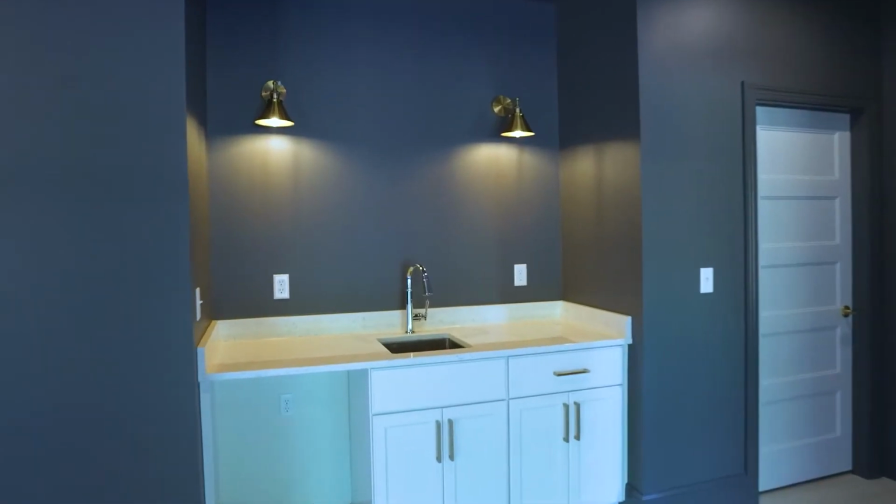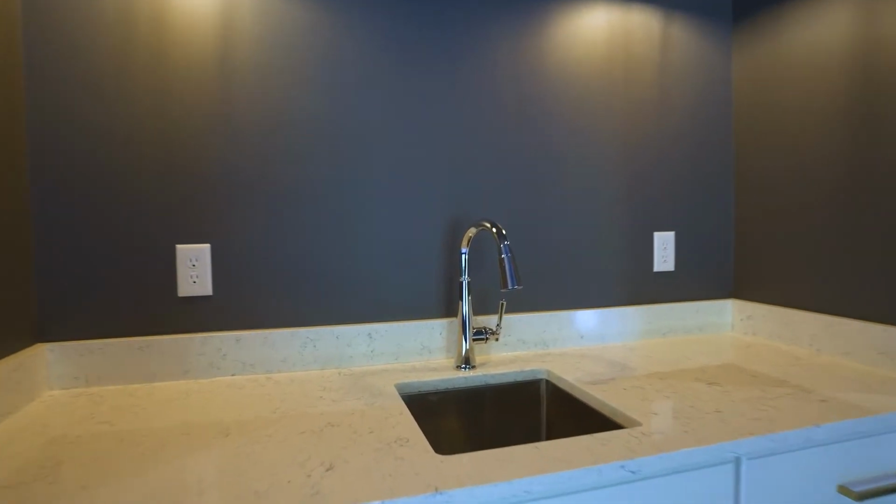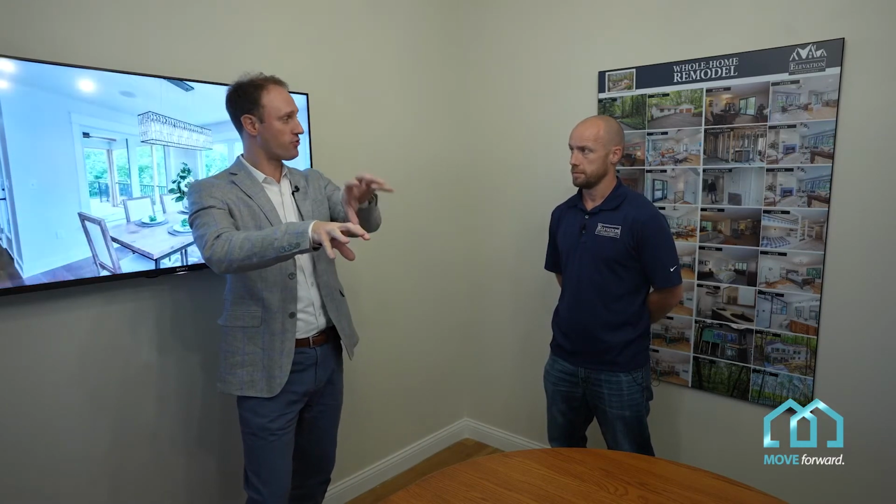I understand they're how many months out? Like months and months out, right? Yeah, some of it is, I mean, it's more on the lines of undefined. Like you put in your order and you might get it in a few months. So the biggest challenge for plumbing fixtures is when you do the rough in, you have to have the cap for the specific model plumbing fixture that you're gonna do the finished trim kit on.